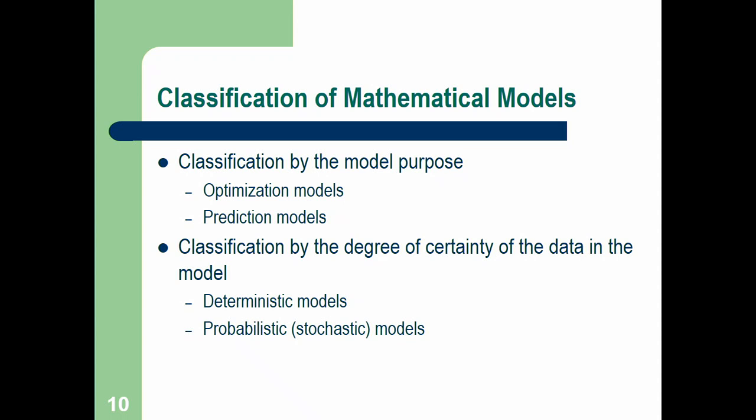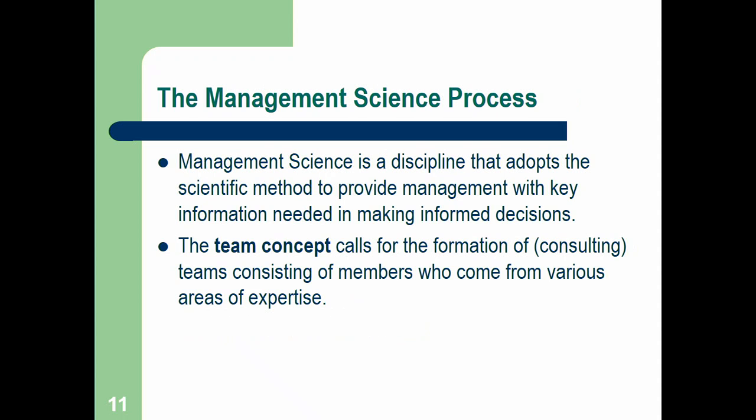If I asked you how long is it going to take you to do something, you may say, it's going to take me 2 weeks, Dr. Miko. But are you guaranteed it's going to take you 2 weeks? You're not, right? Because maybe you get it done early, maybe you get it done in 5 days. But maybe you get it done late and it takes you 3 weeks. So when we build our project management model, we want to build in that uncertainty. We're going to say, hey, on average, it'll take us 2 weeks. Best case, 5 days. Worst case, 3 weeks. So we want to build that into our model so we can understand the probability that the whole project is done within a certain time frame. So these are the types of models that we're going to be discussing in this class.